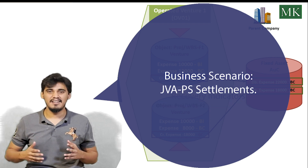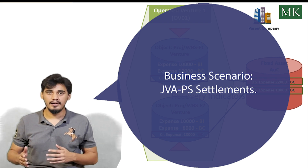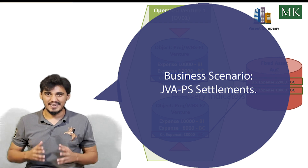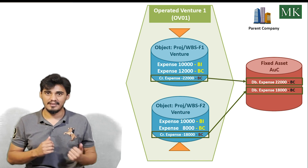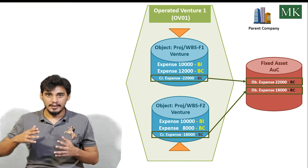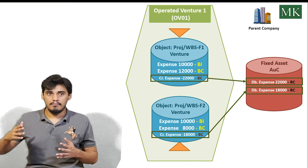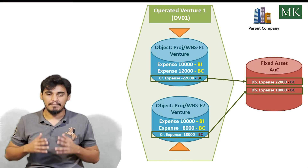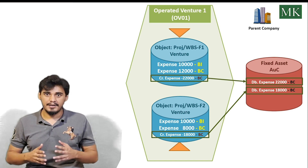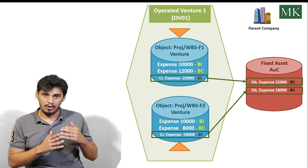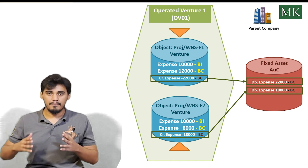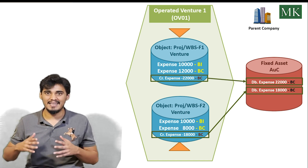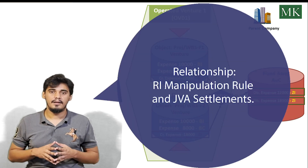Here is the second business case for the recovery indicator manipulation rule, which is for project settlement at period end. The company wants to settle all the costs recorded on WBS elements F1 and F2 to the receiver fixed asset or AUC, so that it will be reported in the balance sheet. Also, the company does not require the credit for this cost booked on the WBS element during settlement to be processed by the cutback transaction and distributed between the operator and the joint venture partners.